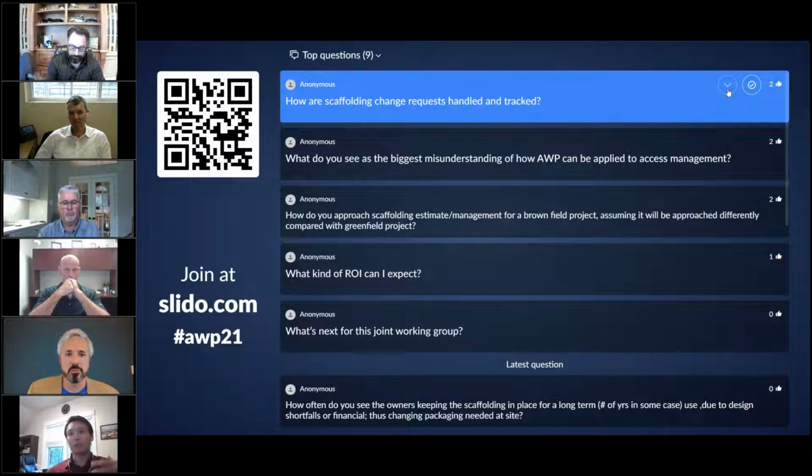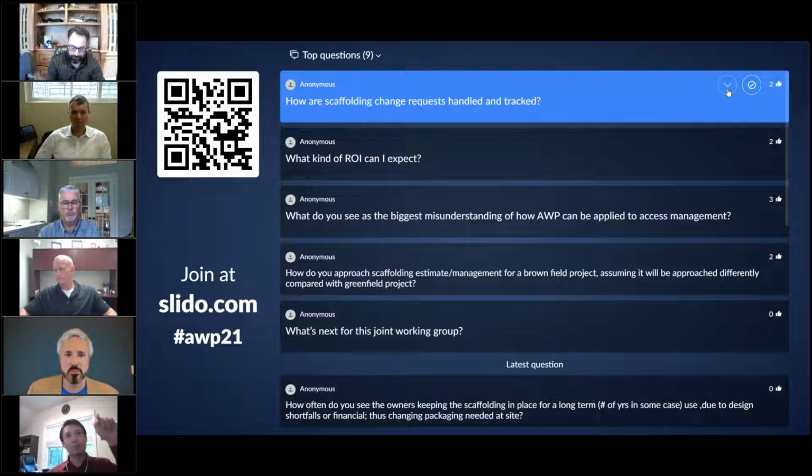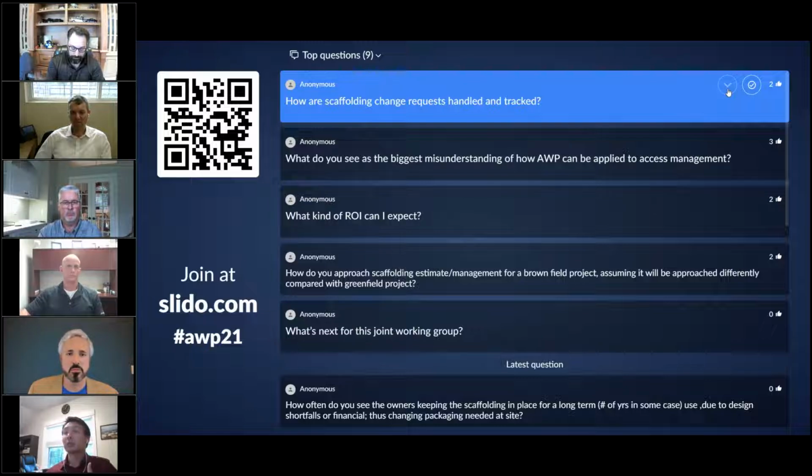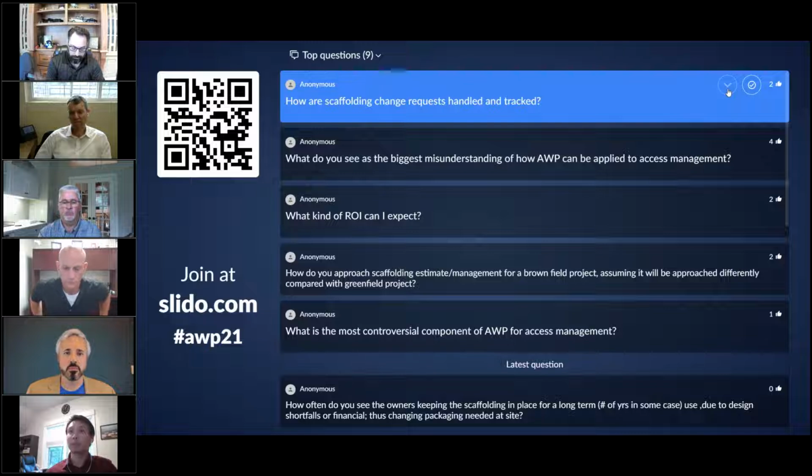So if you look at the actual scaffold effort on a project like that, you get a hump at the beginning, a bit of a low in the middle, and then another hump at the back. It's not linear, but that curve has a unique shape, and different projects have different profiles of what that curve looks like. And I think moving to a more quantities-based estimate will let us know what that curve ought to look like from a plan perspective. And when it actually happens, as it unfolds, we're not surprised that we're burning a little more hours here or a little more hours there, or that we need to save some hours for later on in the project.